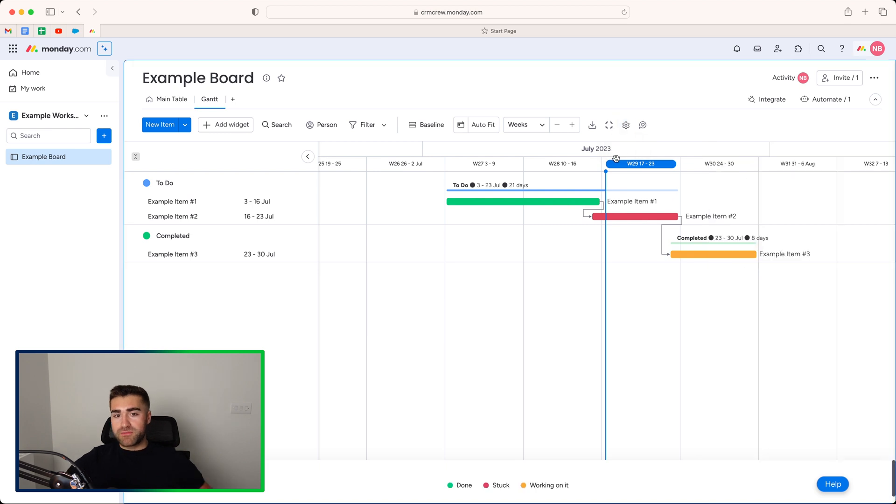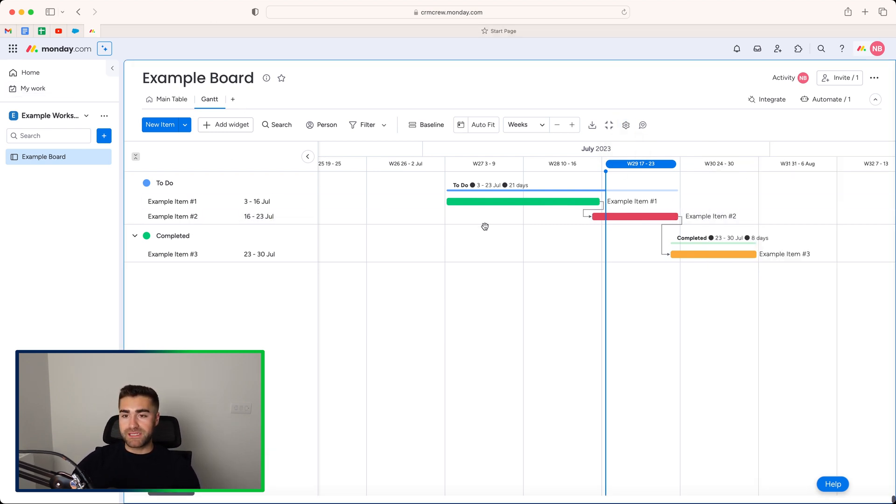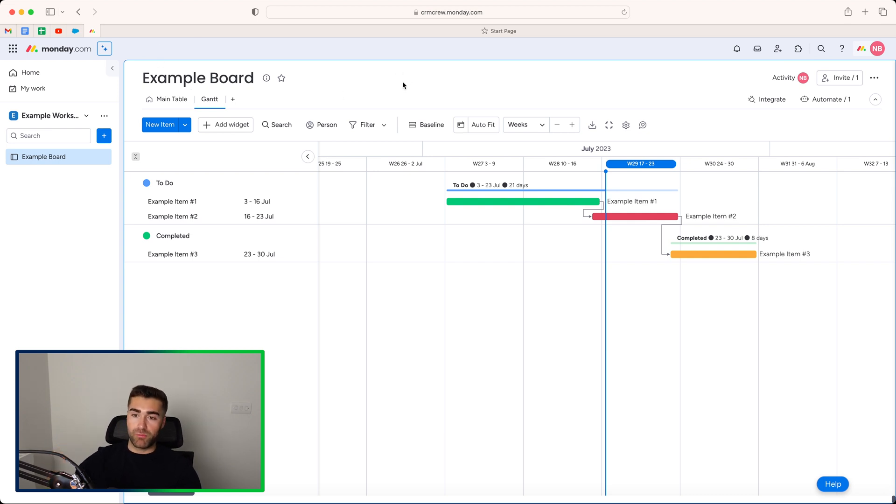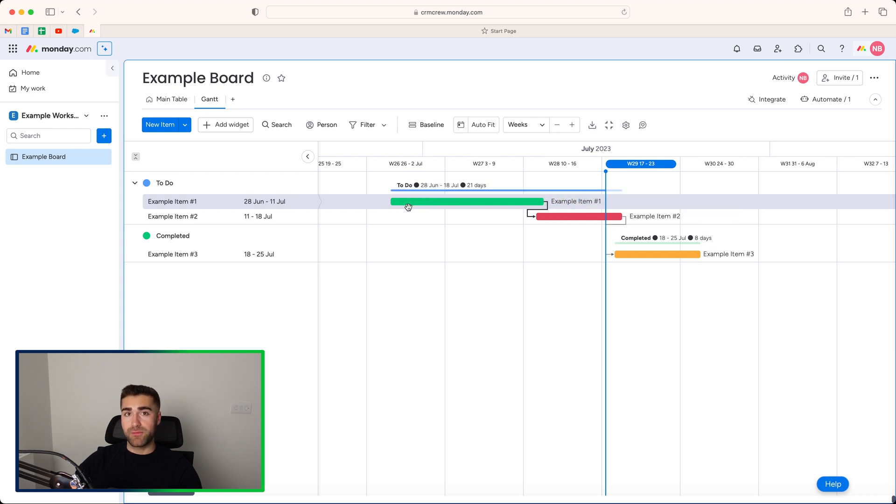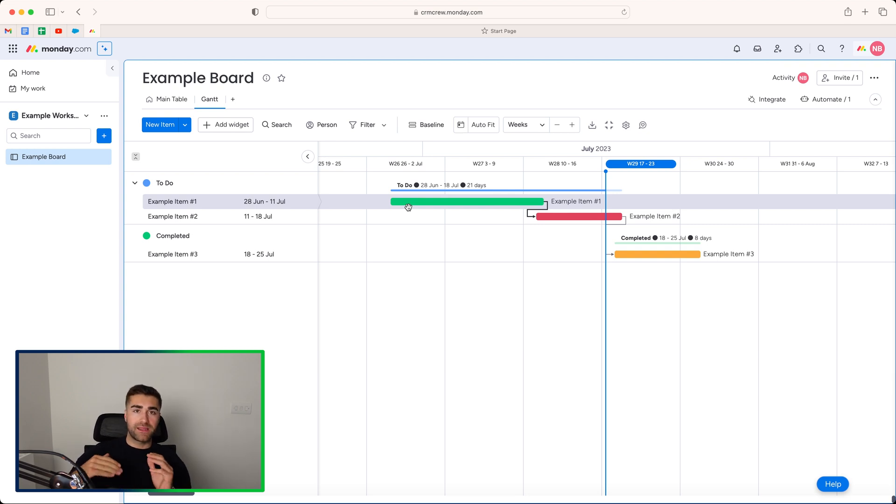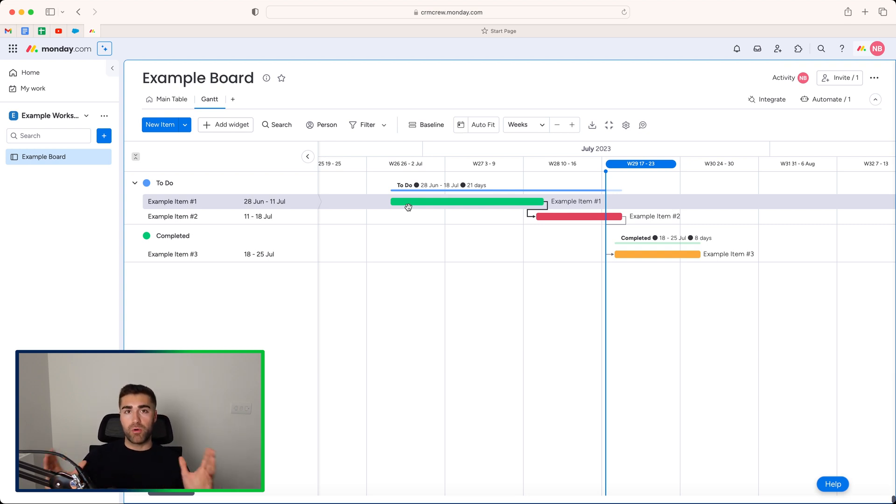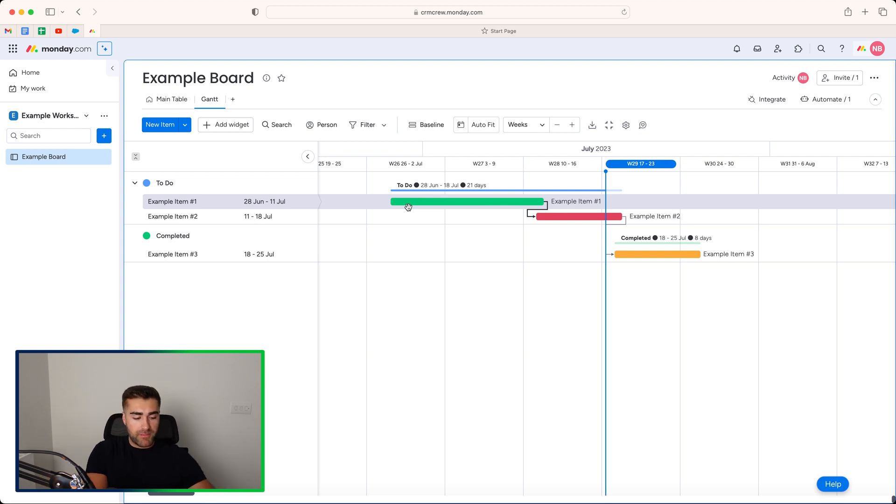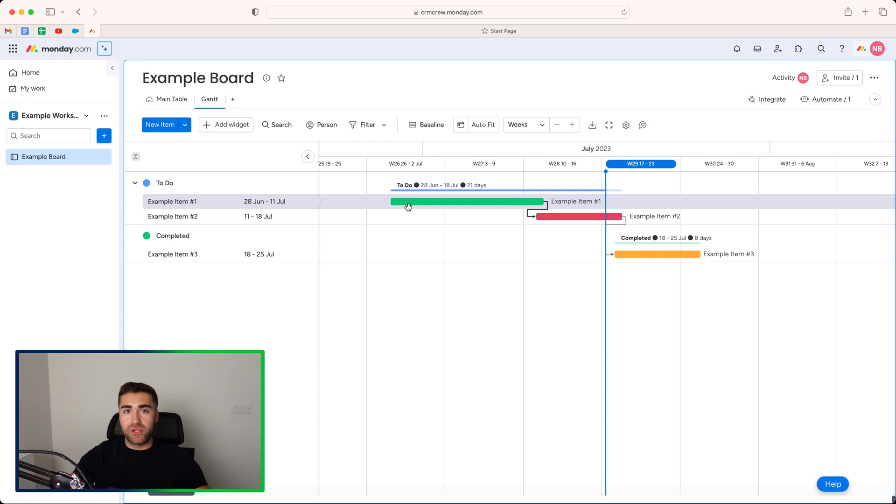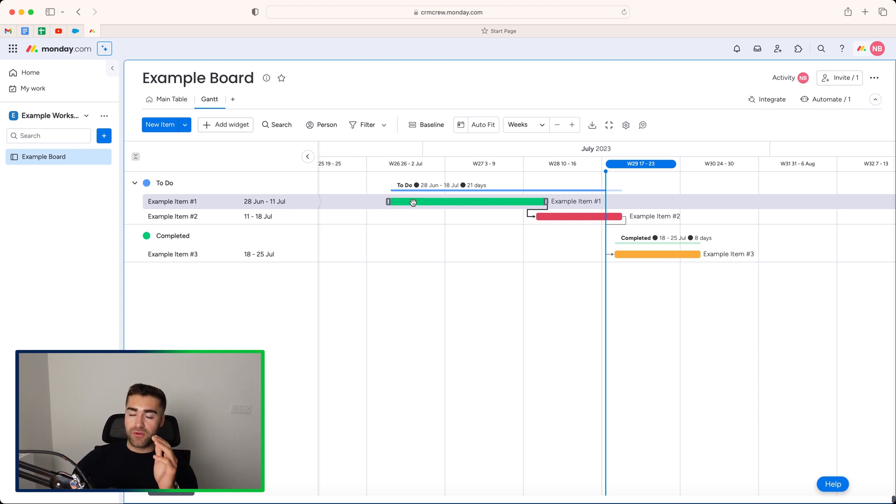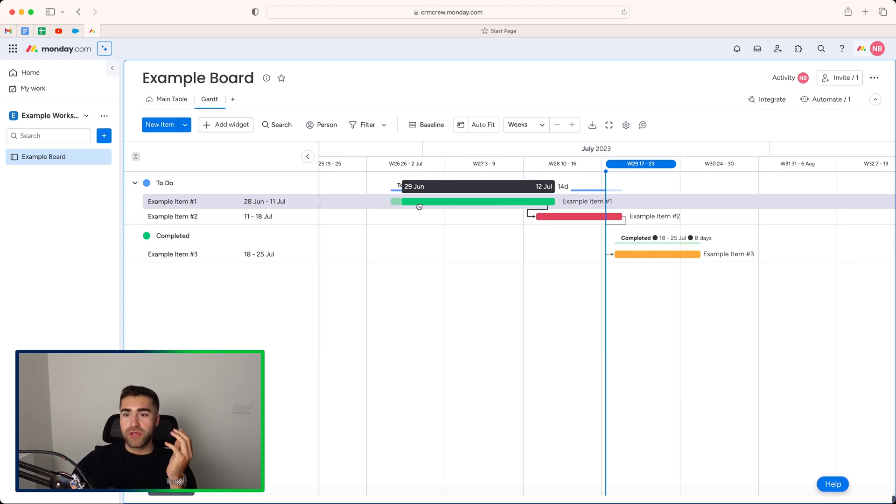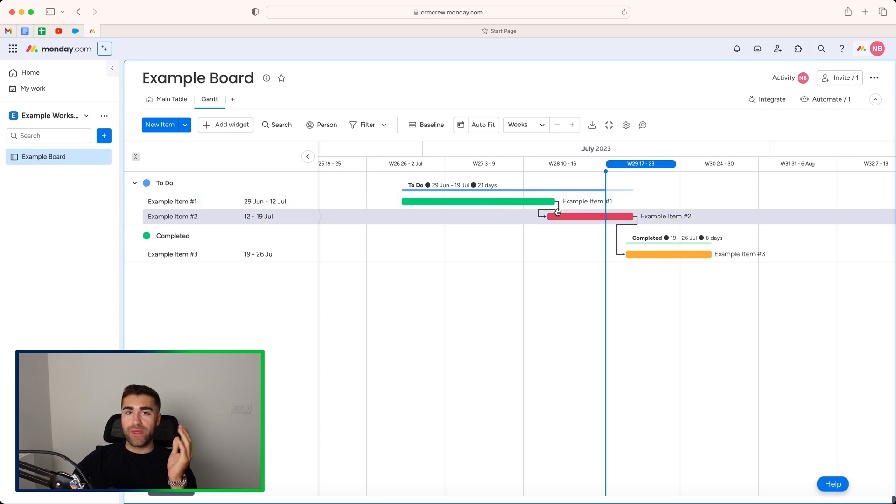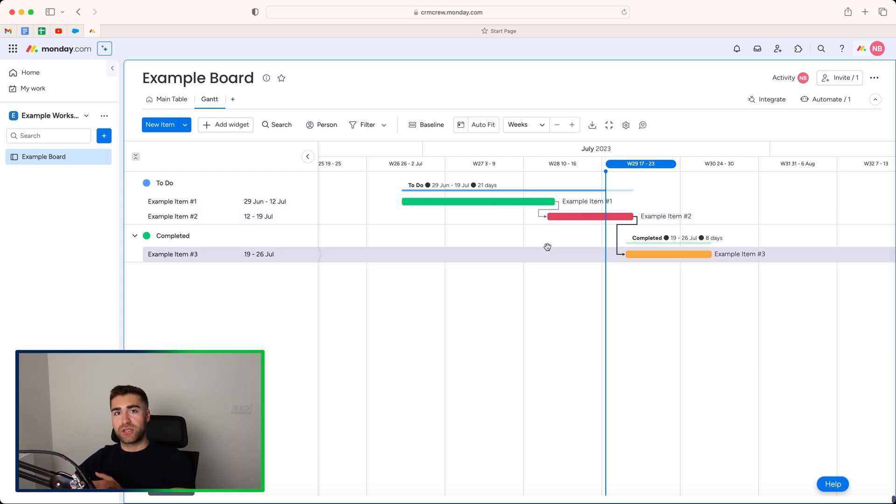So that brings me on nicely to the dependency column stuff. I did demonstrate that for the baseline, but when you've got a dependency column set up and we've got different items dependent on one another, when you adjust one item, the entire project will adjust. So when I would be setting up a dependency column is, let's say there are loads of different things that need to be done for one project, but they're all dependent on one another. So one person can't start until the other person has completed their job. You would use a dependency column, view that in the Gantt view. And then if I, let's say, needed to change the completion date from the 11th to the 12th of July, that will then update the others as well. So you could then see the performance.